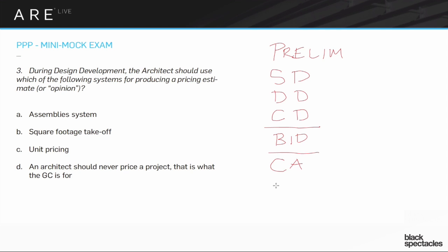After that, you have post issues, which might be commissioning or something like that. You don't always have all of these phases. You often don't have any preliminary or post phases, because if you're not doing LEED or something that requires commissioning, there's not usually a reason to. But you will generally have SD, DD, CD, bid, and CA.